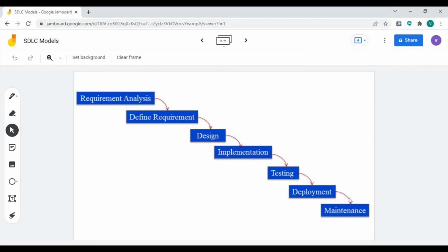The waterfall model is a traditional model, the original model when applications started to be developed. Organizations started to follow this particular model. The benefit of this model is that it is very simple and easy to understand. Once the requirements are properly defined, they freeze the requirement phase and hand it over to another department to prepare the SRS document. After that, once the SRS document is finished, it goes for design, then development, then testing, and so on.